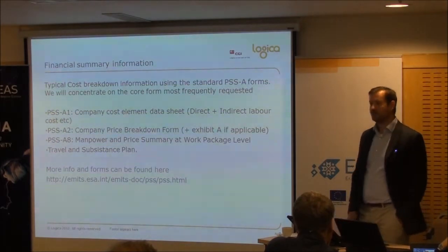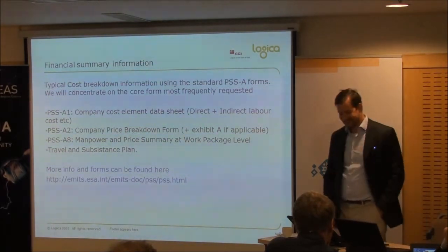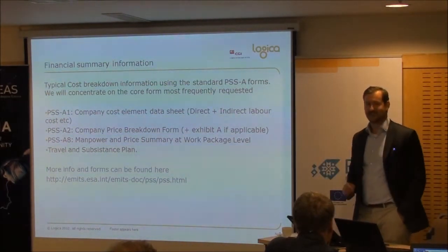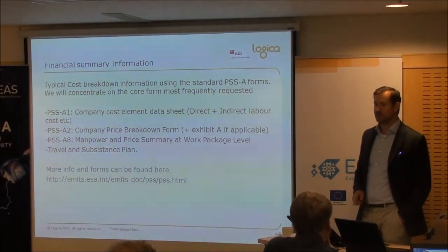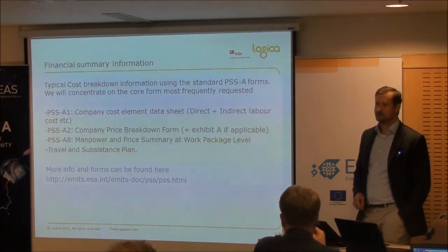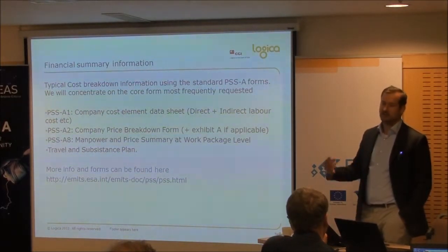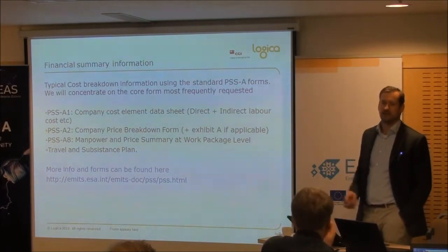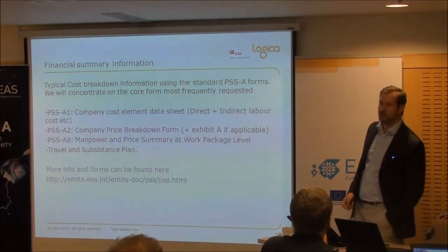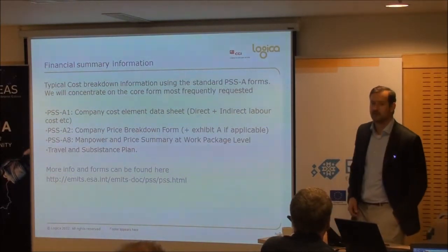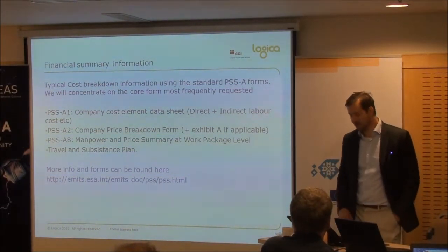And then the painful one, if you've got a lot on your WBS, is this one, the A8. Because this is a work package breakdown. So my advice is don't go below top level work packages. If you've got 10 work packages under one heading and they want clarity, they'll come and ask. But if you try to break it down in here, you really can create yourself an awful lot of work. So try and keep top level if you can.